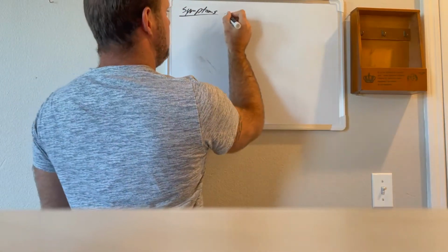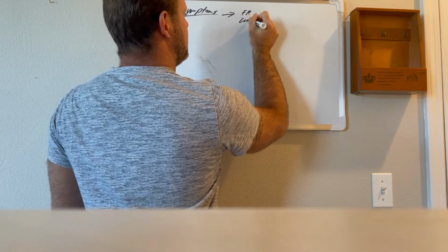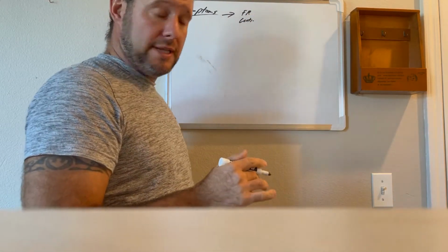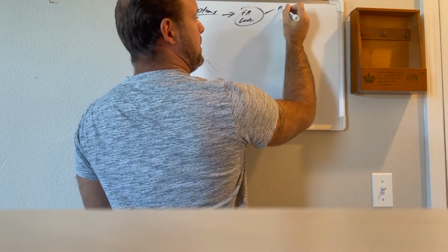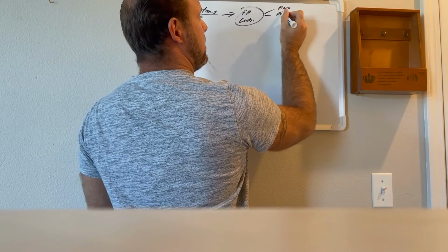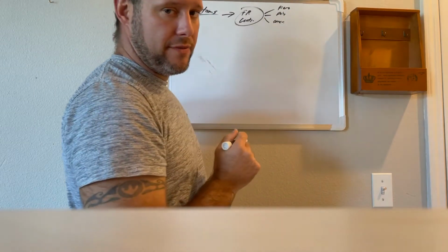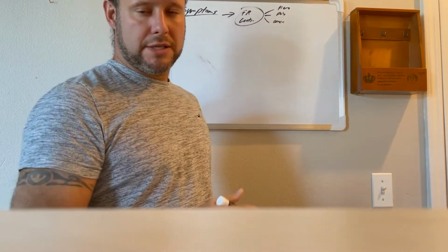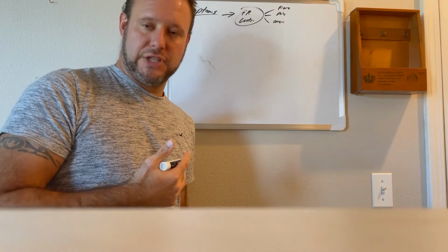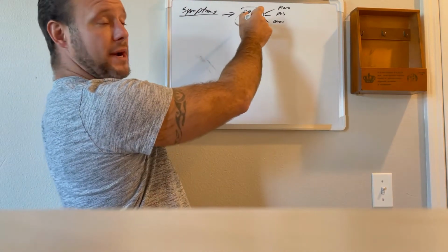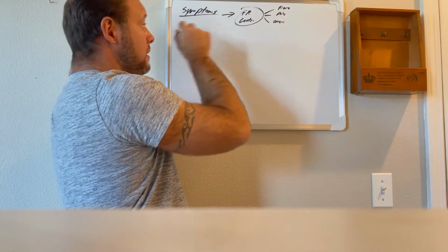So you call a foundation repair contractor. My recommendation is to get in touch with one guy who does piers, one guy who does poly, one guy who does concrete, and see what the three of them say. Most of them should give you an estimate, and then they're going to recommend an engineer, okay? This is if you want an estimate. You can skip this step, okay?